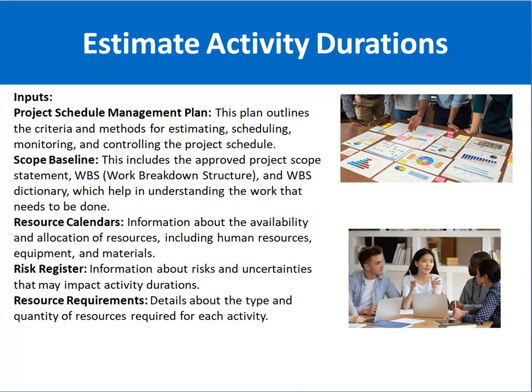So first, the inputs for this process. Our first one is the project schedule management plan. This plan outlines the criteria and methods for estimating, scheduling, monitoring and controlling the project schedule. Next one is the scope baseline. Scope baseline defines the scope statement, the things which we are going to deliver, and also it tells you the things which you are not going to deliver.